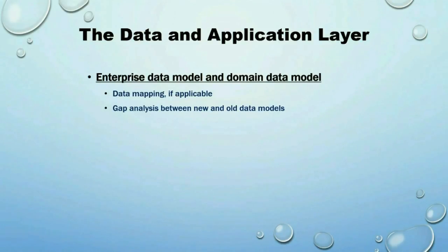I spent almost 3 months just to convince the organization that they do need to conduct this analysis, and then they found out that there are data items in the old data model that have no place in the new data model. I call this homeless old data. And you also find out that in order to maintain the new data model integrity, like foreign key reference integrity, you don't have the data in the old data model to convert over. Now you can't wait till it's time to switch to the new system for production use and then find out all these problems.